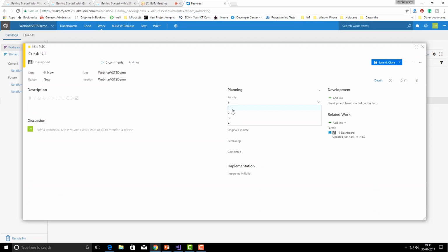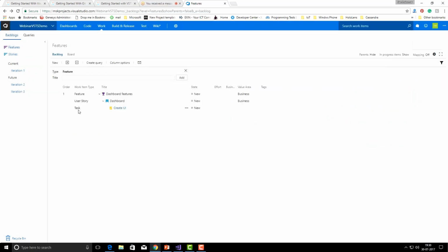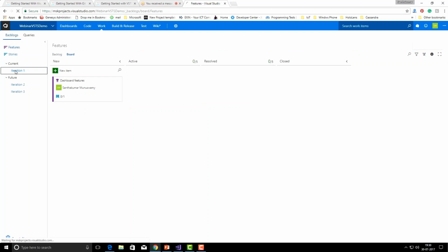So you can set the priority here. You want to run this task in sprint 1. So I select the priority for the product backlog based on the task priority. We can set this product backlog to the sprint backlog. So I just selected two priorities. One activity for design, where I can estimate hours. So likewise, we can create more tasks. So this is for iteration 1, which is sprint 1.